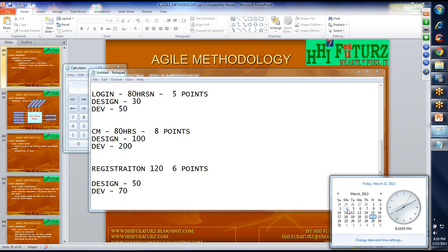For 5 resources, per day only 6 hours he will be working, so 30 hours. So planning day, today your planning means Monday gone, so you cannot develop anything. So 30 hours for 5 resources, one day gone, then next 30 hours plus till 20 hours you have. So 3 days, you can request deployment for Thursday